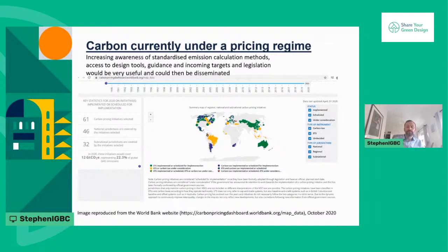In Europe today, the French government is probably leading in building carbon into its procurement procedures, requiring whole life carbon analysis and the introduction of more timber into public buildings. So if you want to win infrastructure and building contracts in France, this is going to be crucial. In France, you can't make environmental claims about your building products unless you have the data in the form of an EPD to back it up. Holland requires whole life carbon assessments for planning permission.